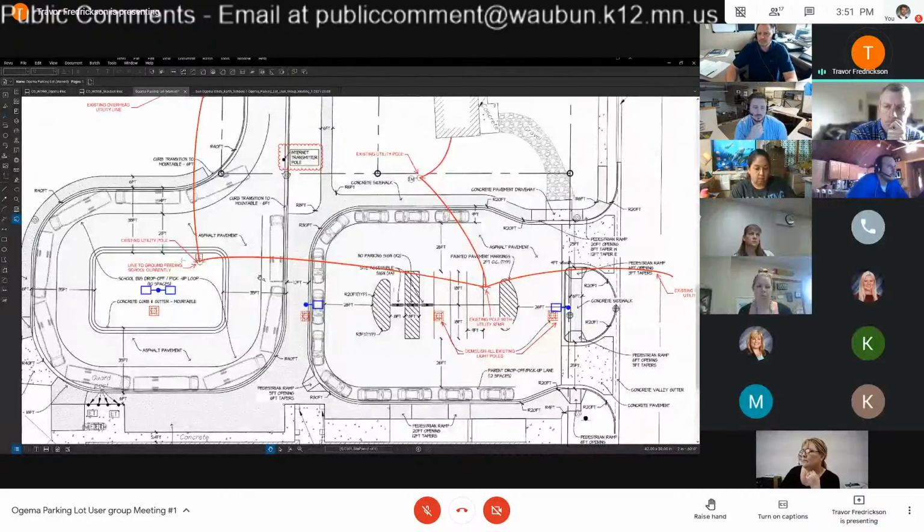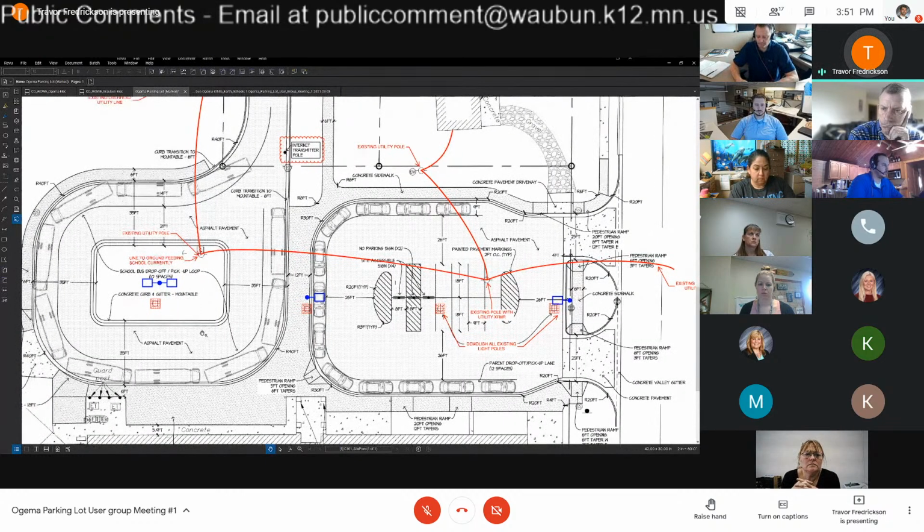I'm going to have to coordinate with Otter Tail Power to see if we can either shift both of these poles to the north completely, or just get rid of them and reroute this line maybe up to here. I know that's something that they'll have to do, and typically that's free of charge from them. We may have to deal with some costs with reburying this line to your new transformer location, but other than that, it shouldn't be an issue.